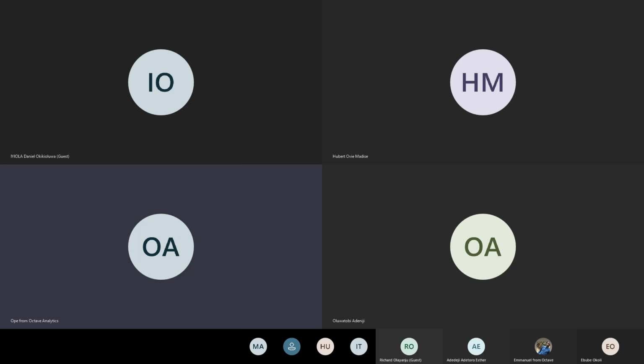Then at the beginning of a new sprint, you can pick from your backlog, or you can pick from your new tasks to say, okay, these are the tasks that you want to achieve within the 2 weeks, and these are the expected goals.